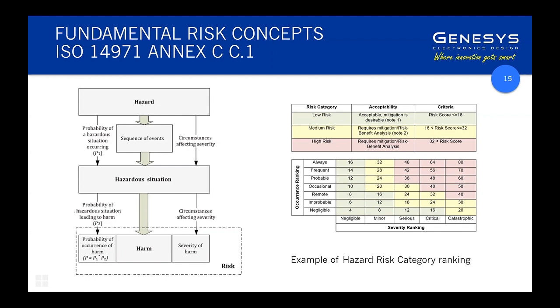So a whole sequence of things have to go wrong before the catastrophic outcome of crashing the plane occurs. So you can ascribe a probability that each of those steps in that sequence will occur. And this is a tricky thing to do in a coherent and justified manner, to say what is the probability of those events. And it's generally necessary to engage with the clinicians who will have information to say, in their experience, for example, in surgery, what is the likelihood of this particular event occurring that can lead to a hazardous situation?